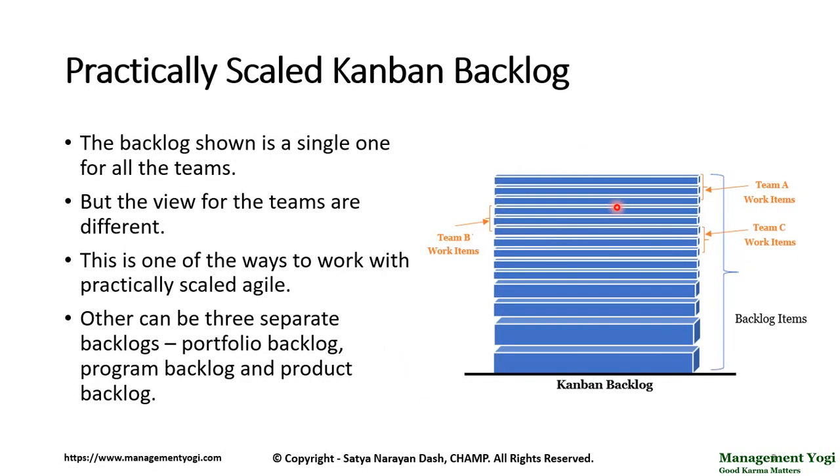Now when I talk of scaling, it means you are going to scale many aspects of the Agile framework that you are using. Currently we are using Kanban, so there will be events such as planning, refinement, review, demonstration. Those are to be scaled. Then you will have artifacts such as the backlog, or Kanban product backlog, that has to be scaled. Of course, the teams will be more. That is not a single team. You will have more than 2 or 3 teams, maybe 9 or 10 teams working on the single product backlog, which is a large product.